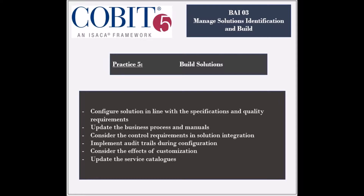Audit trails should be maintained during this phase, and the business processes and related procedures should be updated. The solution's customization and changes should be assessed, and the interoperability of the solution components should be ensured. If needed, the service catalogs should be updated.